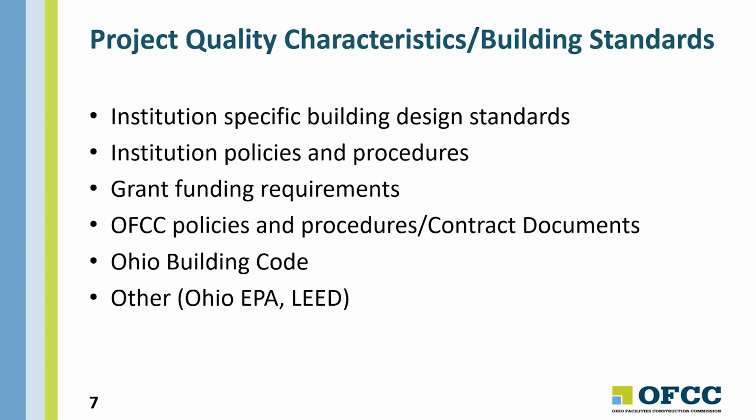There may be other codes that apply. The Ohio EPA has regulations as far as stormwater water quality. And if you disturb 1 acre of land or more, you're going to need an EPA stormwater permit.